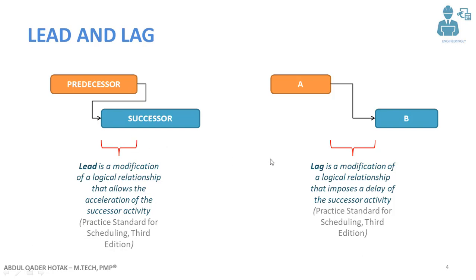In lag, you delay the successor activity. This can be for different reasons — for example, in the construction industry, when casting concrete you must wait a specific amount of time for the concrete to dry before carrying on with other work. This waiting period between activity A and activity B is called lag. Lag is a modification of a logical relationship that imposes a delay on the successor activity, as defined in the Practice Standard for Scheduling, Third Edition.